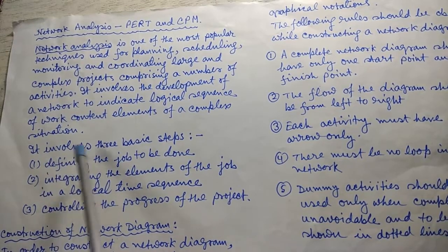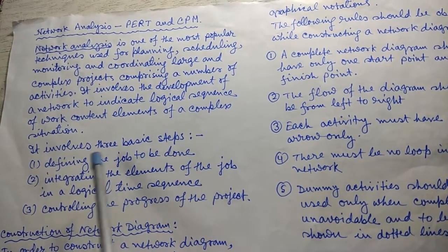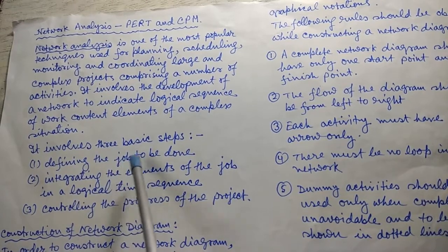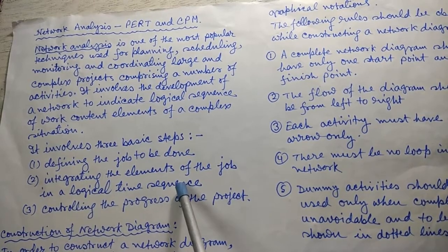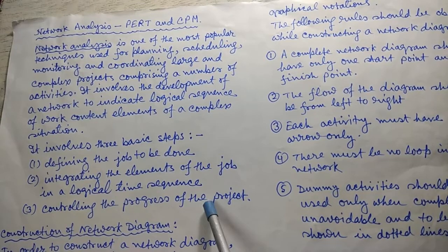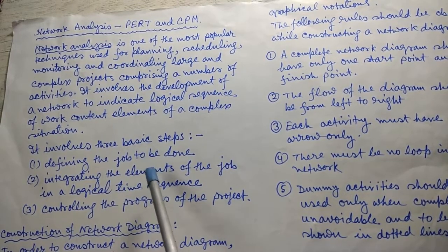It involves three basic steps: defining the job to be done, integrating the elements of the job in a logical time sequence, controlling the progress of the project. So this is network analysis.